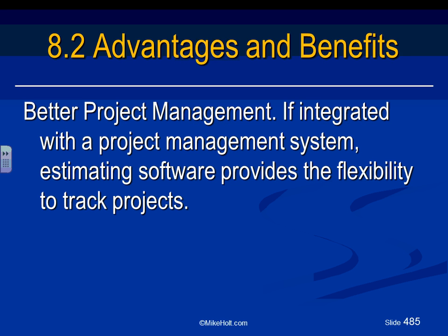Project management, the software makes it better for project managers. Like I said, guys, integrated with the project management system, estimating software provides the flexibility to track projects. You can integrate all the time and material, all the time that is needed to build the project. You can interface it with a management system and have the construction schedule. Develop the construction schedule based on the estimated time, manpower or people power that it needs to build a project.